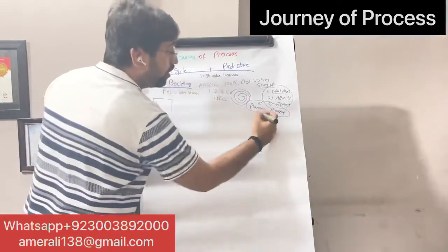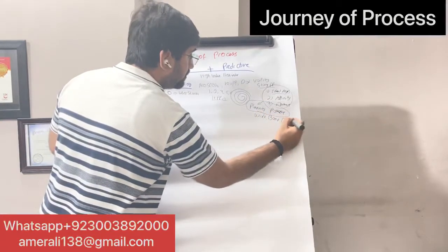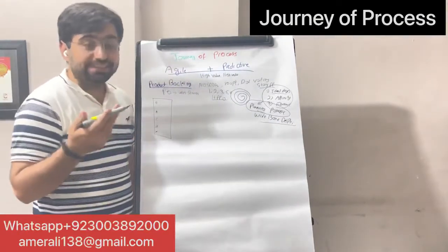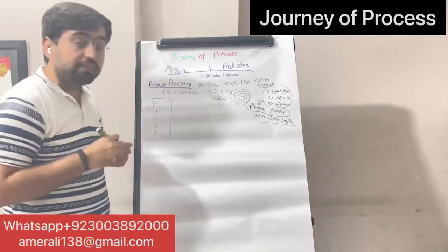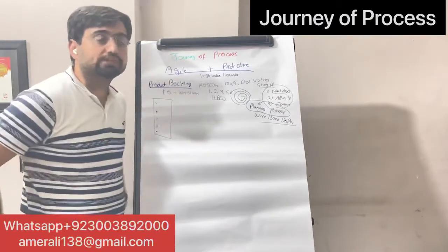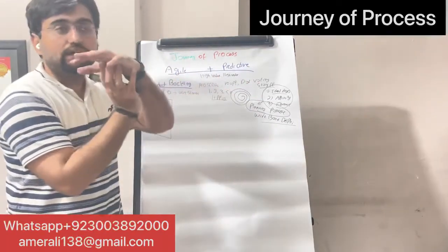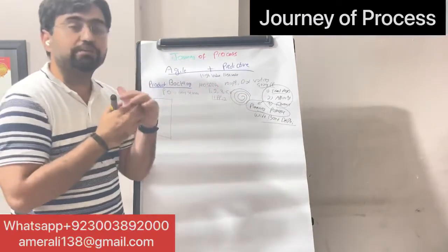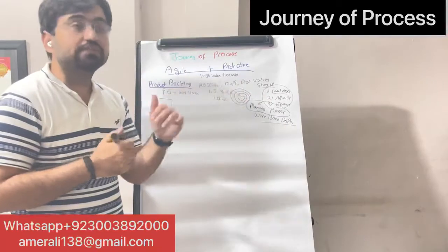So instead of planning poker, we can also use wideband Delphi. The purpose of wideband Delphi is also to achieve consensus on the story point. In this technique, the Scrum Master goes to each team member secretly and asks, hey, why do you think this should be the story point? Then he takes that reason, goes back to team member one, and acts as a facilitator, a bridge in between, and tries to reach consensus without the other party knowing what the other party has said. In this way he reaches consensus.